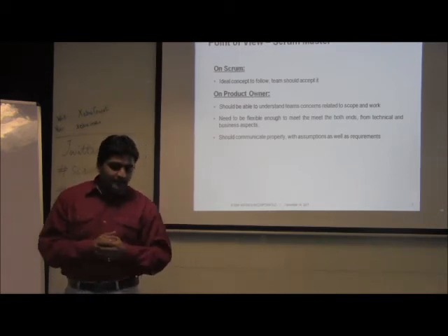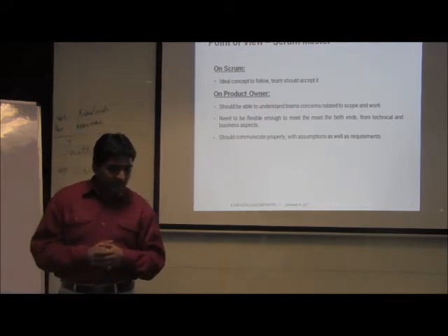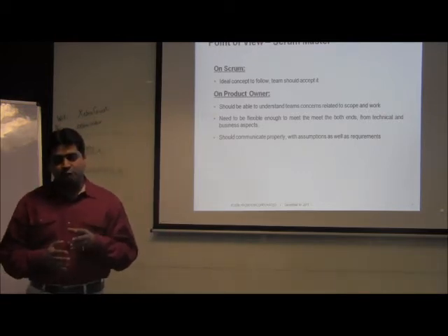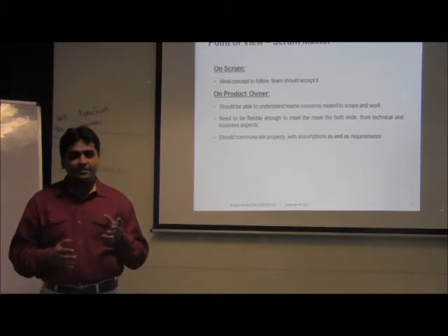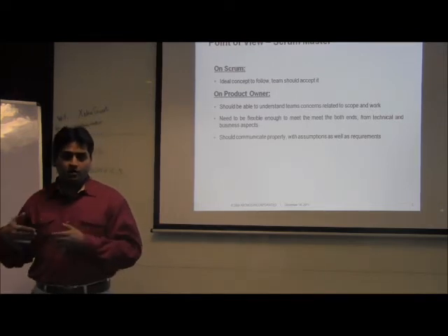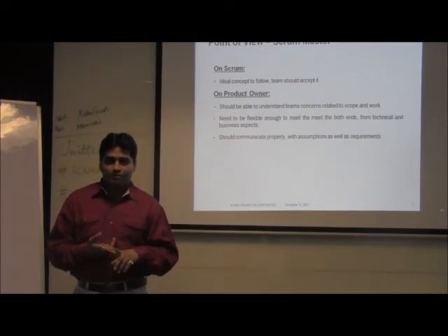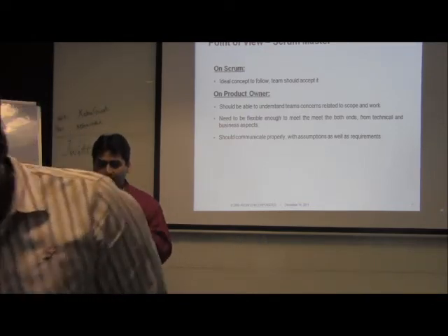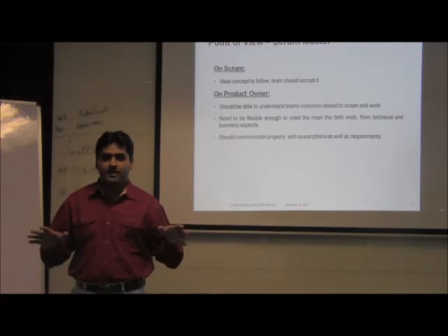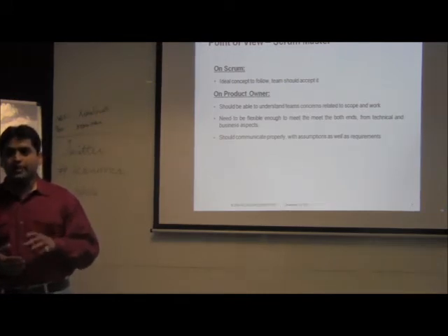He needs to be flexible enough to meet both ends, from the technical and the business aspects. I have previously covered this as well, and he should communicate properly with assumptions as well as requirements. Assumptions are a really tricky thing in the software industry. There are many things which we assume, but those assumptions generally are not communicated to everybody, including the development team or the management team. After 3-4 weeks, midway through your development cycle, when you see that those assumptions are not falling in place, everything goes bang bang. So that is related to communication. Assumption is something that we should not forget to communicate to everybody.